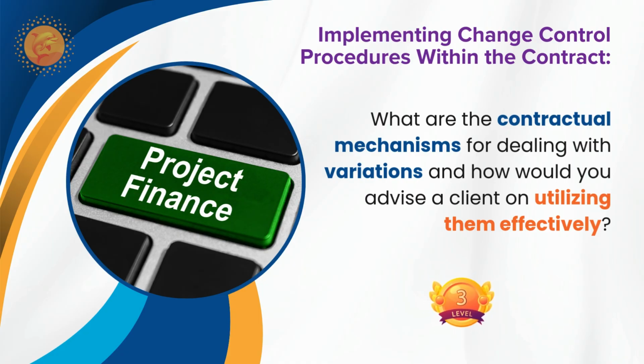Yes, this is Sohail. Yes, Dinakaran, please. In our company, we have the change management procedures, which are shared by the client itself. They share this as part of the contract, and it is mentioned that the change management procedures need to be followed. And in the change management procedure, we have the timelines, how the change needs to be initiated. If it is initiated, who has to notify, what is the change, how to define it, and even the templates are there inside the change management procedure guidelines.